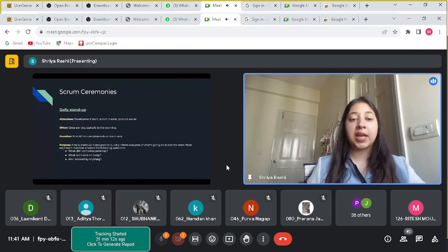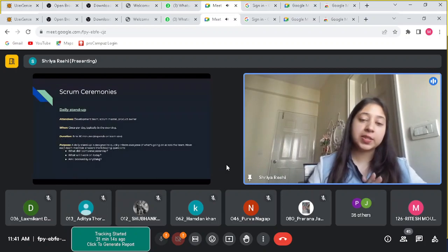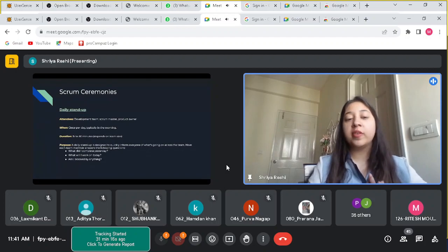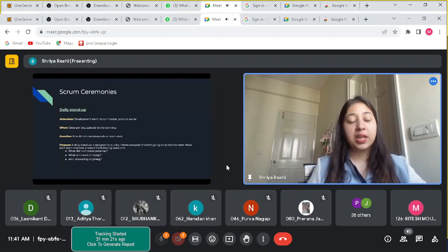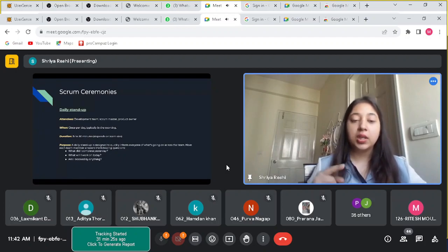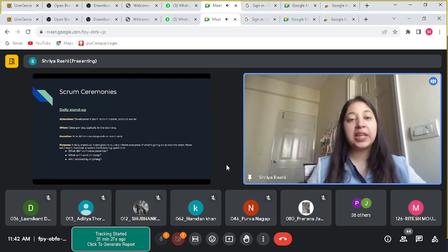Next up comes daily stand up. Now, you have decided that for this sprint, which is 2 weeks, you will be working on a homepage feature. Now comes into picture daily stand up. Attendees for this are same: the development team, the scrum master, the product owner. It happens every day, typically in the start of the day, and it lasts for 15 to 30 minutes only.